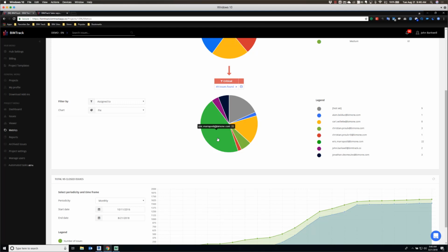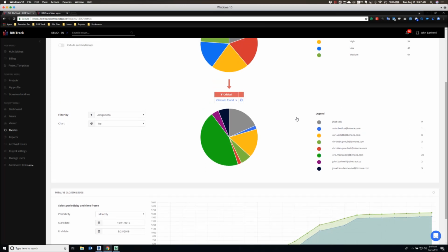He's either been out sick or he's on vacation. Something's wrong. What I can do is a multi-edit and select half of Eric's items that are assigned to him and maybe assign those over here to Alan, because Alan's only got one item. So he's got a little bandwidth. Maybe he can help Eric out. So me as the BIM manager, it gives me that transparency before, you know, Friday's coordination meeting to mitigate that risk, those issues getting done on time, so that when we get into that meeting, we're talking about a whole new phase.